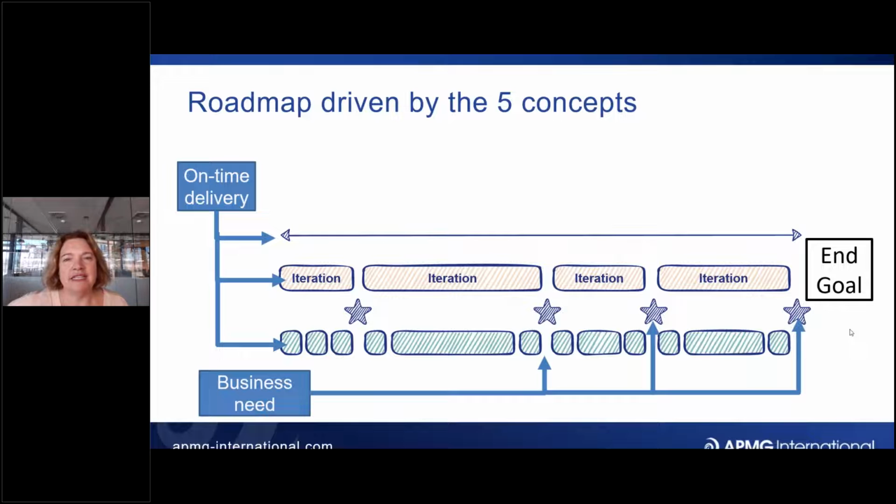And that's where we get into business need, that we're constantly prioritizing in Agile planning against: well, what will make the most difference? What will be the most useful? What will solve the most problems? So business need is critical, rather than in other planning techniques, a more waterfall approach. The planning is driven by a logical sequence of events. So I'll do this at the start, then this, and all that flows into that, and then I'll do that, and then I'll get to the end.